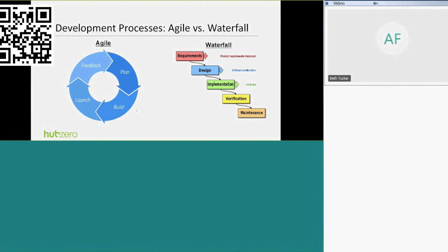And you can contrast the Agile software development approach to another software development approach called the Waterfall method. And in the Waterfall method, each step in the development of an application or a component is sort of separate from all the others, and progress only goes one way. In general, you collect all your requirements, you do the design, you implement, and then you generally don't go back. You don't revisit designs and change implementation. It just sort of goes one way, whereas with Agile development, you're constantly iterating and including new features or changes based on meetings with the customer.